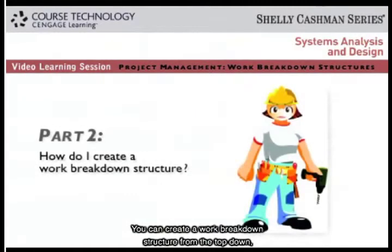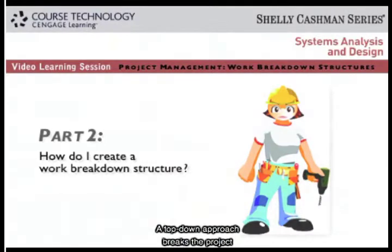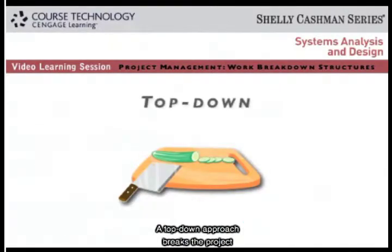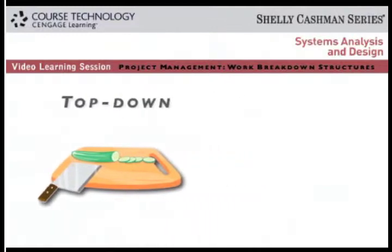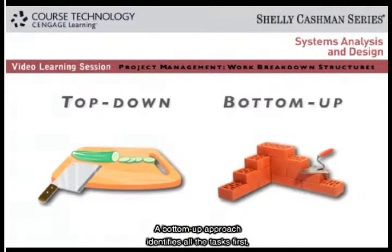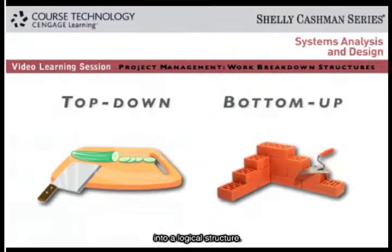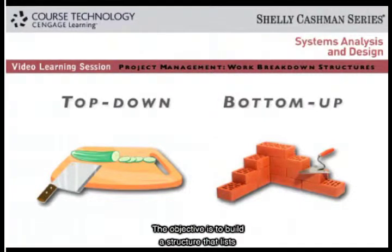You can create a work breakdown structure from the top-down or from the bottom-up. A top-down approach breaks the project into smaller task groups, and then into individual tasks. A bottom-up approach identifies all the tasks first, no matter how small, and then builds them back into a logical structure. Depending on the project, you might use either method, or both. The objective is to build a structure that lists and describes all tasks accurately.